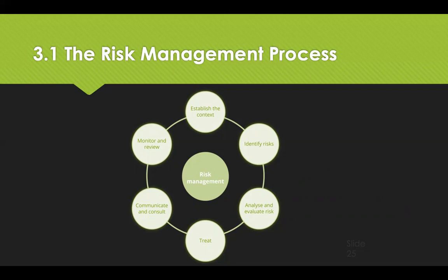We then treat the risk, putting in place measures to control it and take action. Communicate and consult, keeping stakeholders informed depending on their involvement, power and influence. And then monitor and review. Monitor the horizon for other potential risks and update the status of the current ones. Now, following this process might lead to an increased likelihood of identifying risks early and therefore being able to put in place measures to reduce the impact.